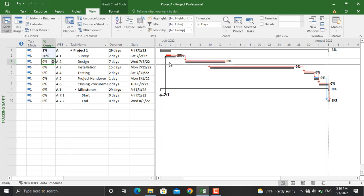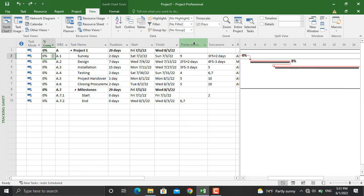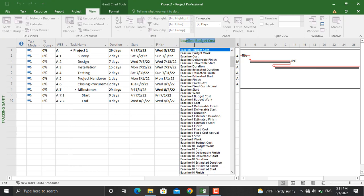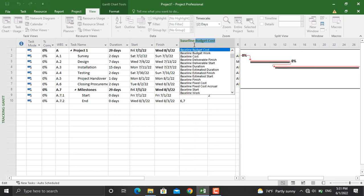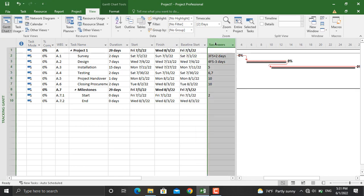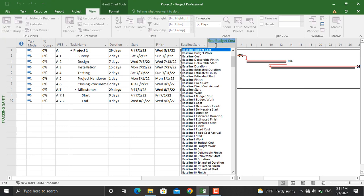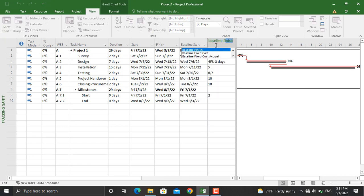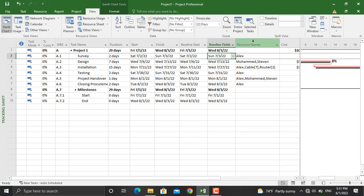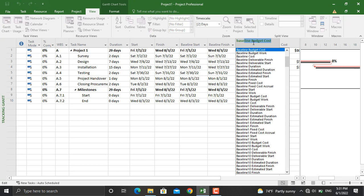I will undo this. Moreover, when you baseline your project schedule, you will add the baseline, Baseline Start, and the Baseline Finish. In addition to that, you can add the baseline cost.